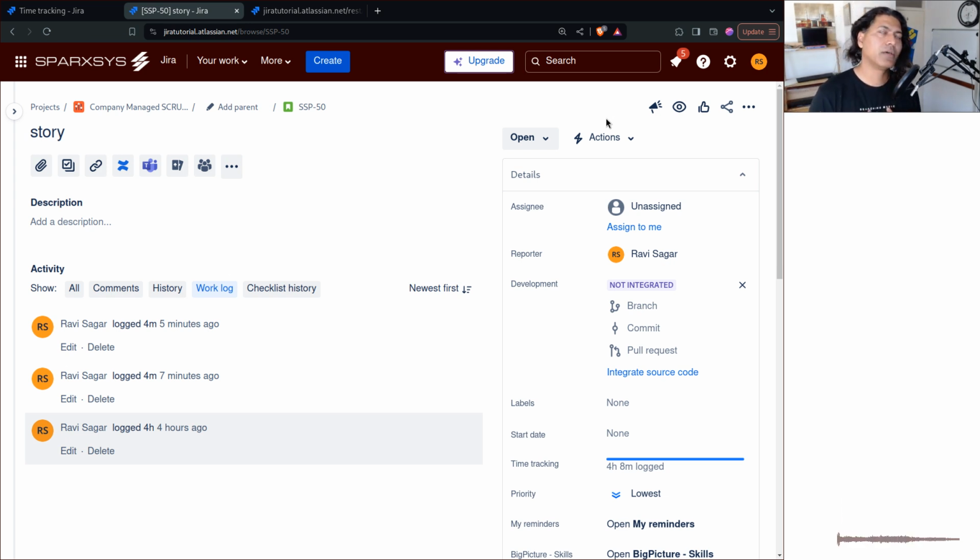And usually what I prefer is a Confluence page where all the announcements go, with a time stamp, like a date, and keep a list of all the announcements. Then from that page, copy it and send it to Slack or email. And in that email, have a link to that announcement page. That way you will have a record of all the past announcements. And yeah, that is it. That is all I wanted to talk about in this video.